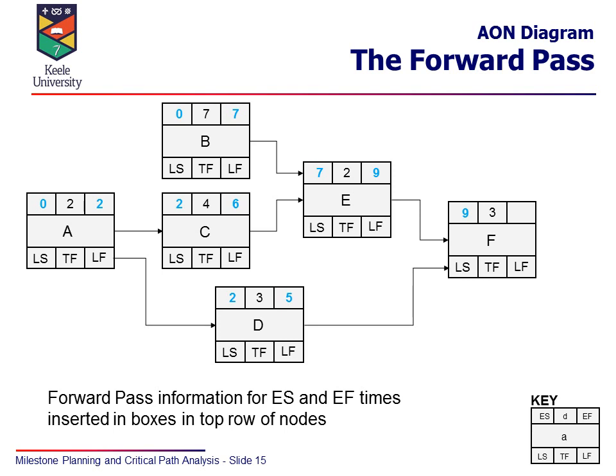Activity F, again the same situation here. F can only start when D and E are complete, but activity E doesn't finish, or the earliest that can finish is day 9. So we put in 9, plus 3 days, and so the total time to complete the project, the earliest the project can finish as a whole, is 12 days. So that's the forward pass. So that's the mechanism of doing that, and actually that calculates the total time for completing the project.